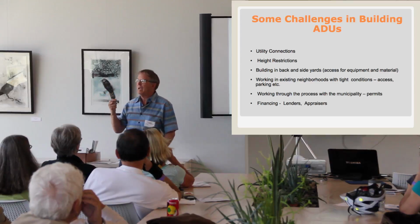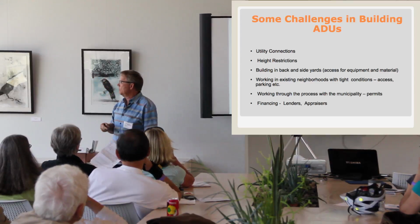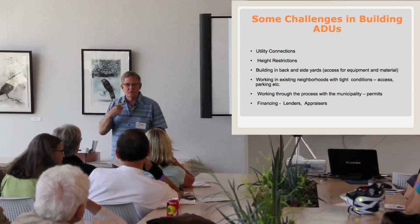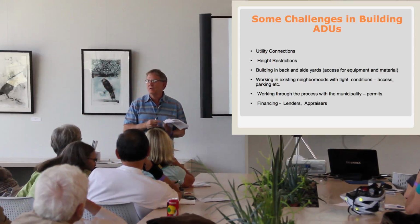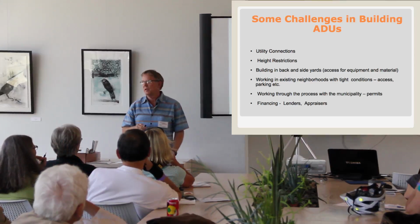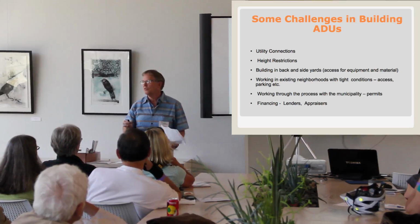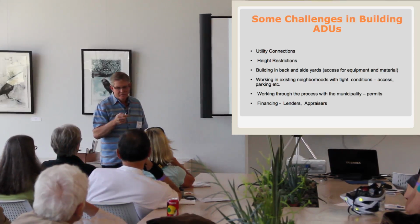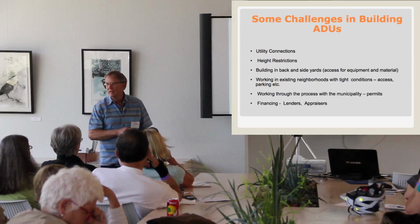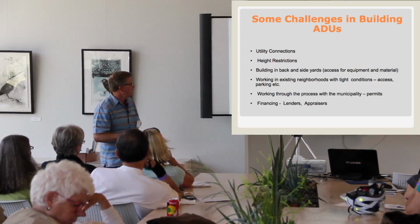I don't know about you guys, I had to drive here because I came quite a ways, and there's about three or four rounds around the blocks to find a parking space. Well, think about plumbers, electricians, heating contractors, framers, all those guys have to work on the house with trucks. So that's always an issue to figure out ahead of time. Where are these guys going to park? How are they going to access the site to work on it?